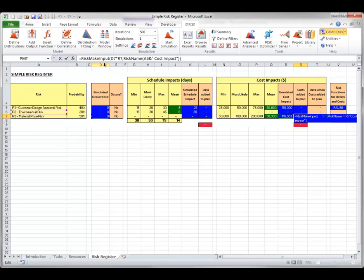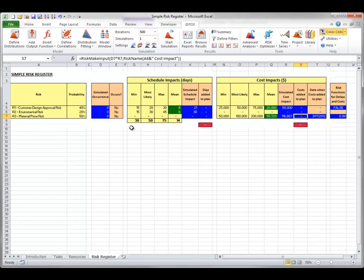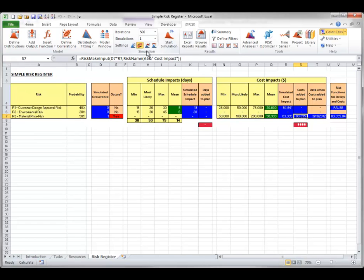The linking of a risk register to a schedule is best shown during a simulation. First, you can toggle the At-Risk dice button to random, then press the F9 recalculation key a few times as you watch the register. You will notice that the Occurs cells turn red when a risk occurs — the red is caused by conditional formatting. When a risk occurs, values are then shown in the register for the schedule and cost impacts, sampled from the At-Risk distributions in the register formulas.